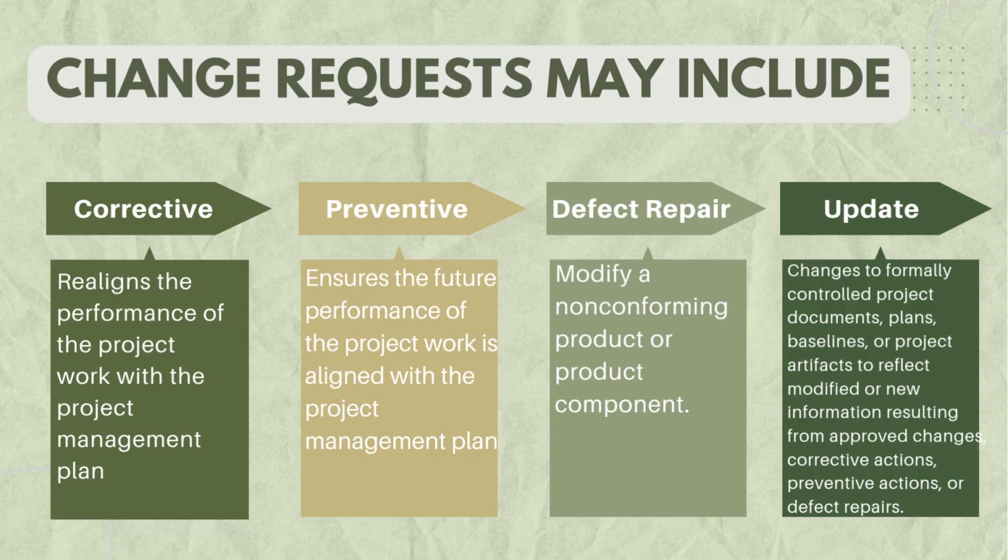Let me give some examples of corrective actions. When the project is behind schedule, you can reassign resources or add extra staff to critical path tasks. Also, say if you are finding frequent defects in deliverables, then you can take a corrective action such as implementing more rigorous testing or providing team training.